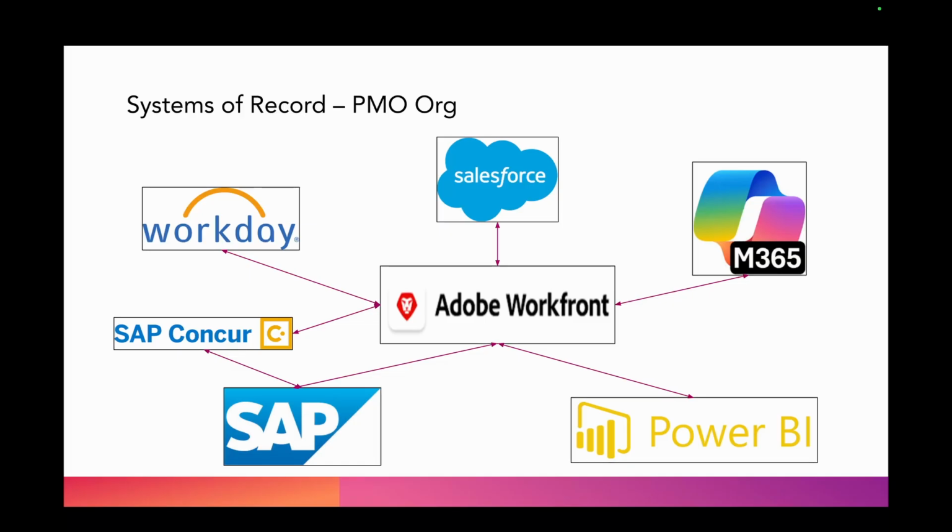So when you worked on a project and you logged an hour, that was a cost against that project, and that would need to flow into that project that was stored in SAP. So finance still maintained the system of record with all the financial information, but the project managers now had visibility in their tool, in Workfront, of seeing their total cost of the project.